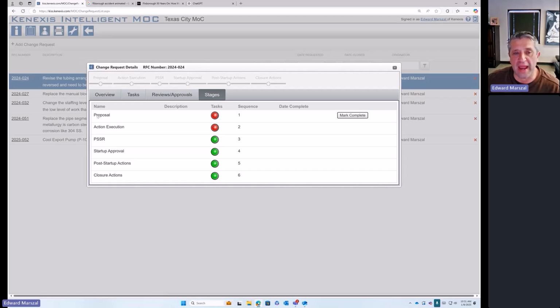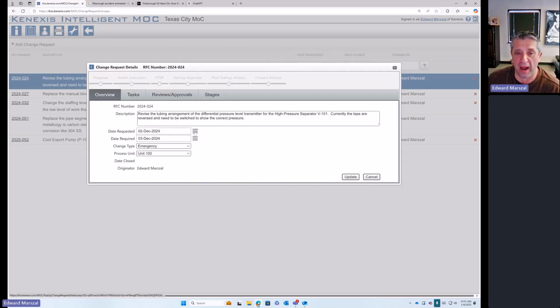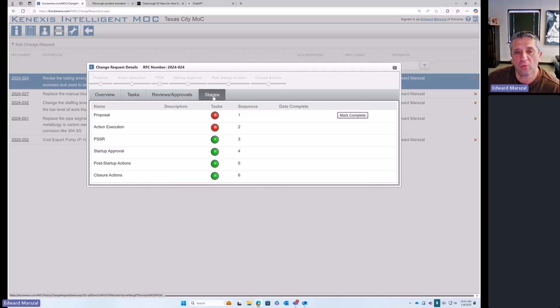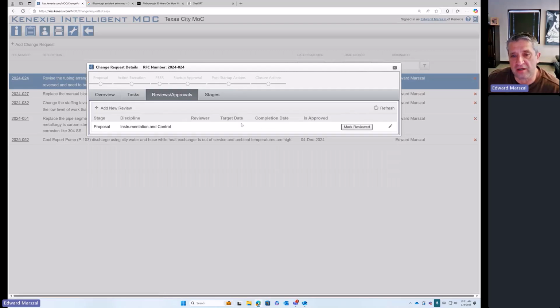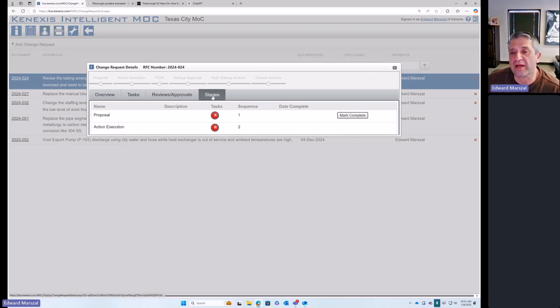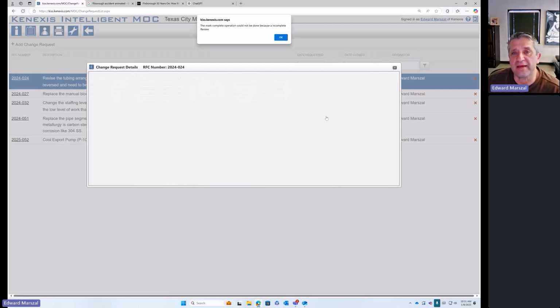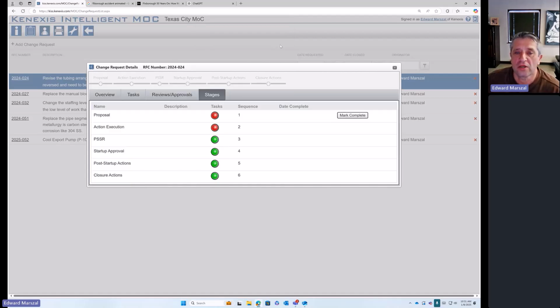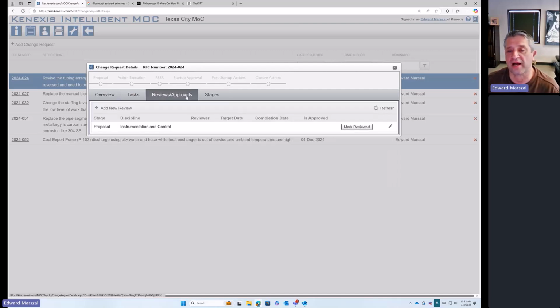So if I want to say, okay, I'm done with my proposal, I mean, I wrote all this stuff up, we're good to go, it's approved, yes? Well, no, it was not approved, because this approved field has nothing in it. So when I go to stages and I try to hit mark complete, it's going to say the mark complete operation could not be done because of an incomplete review. So basically, it's not going to allow me to proceed to the next stage because either tasks are incomplete or reviews or approvals are not done.